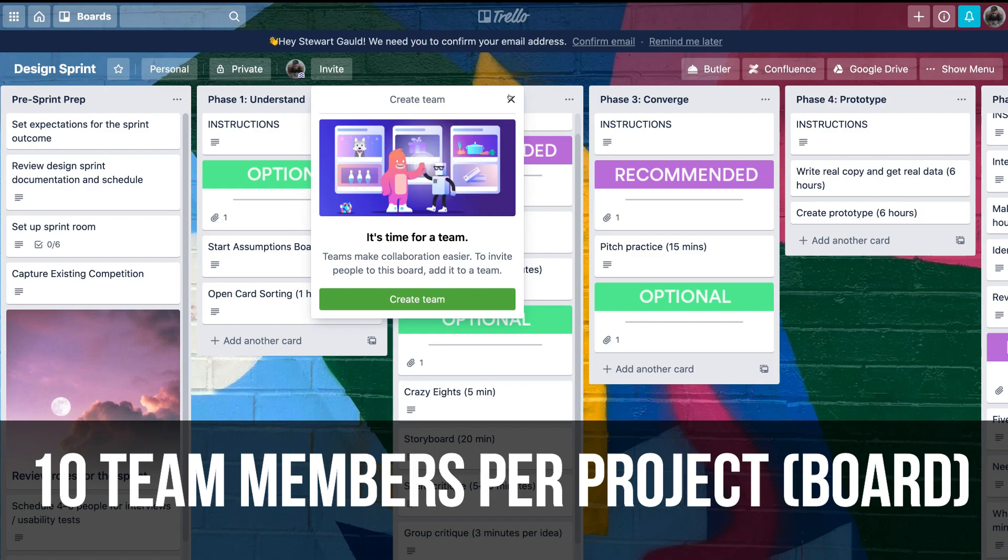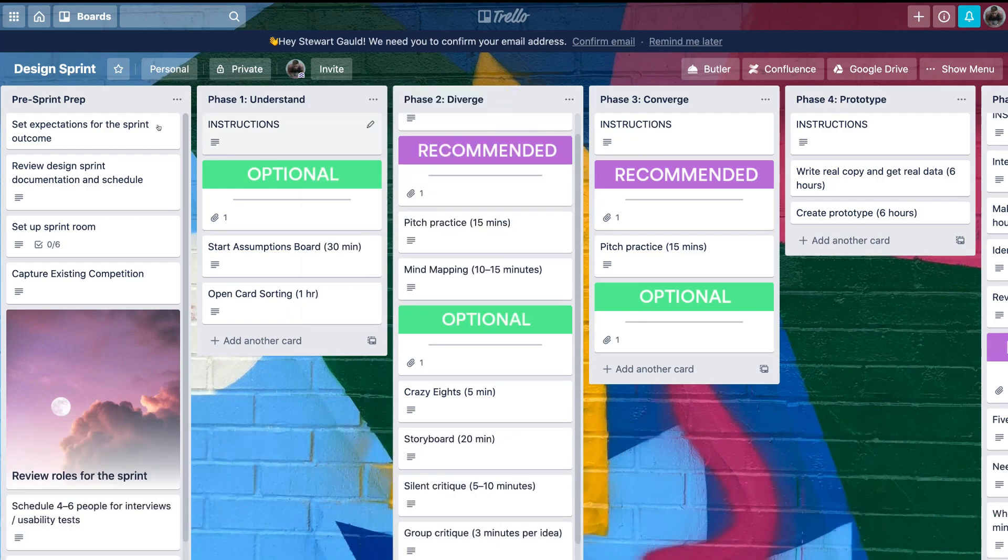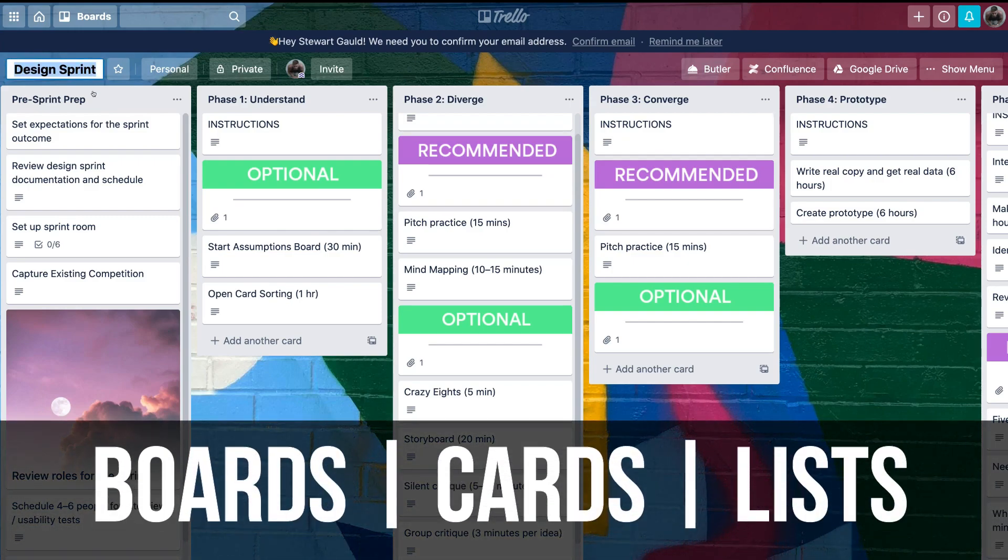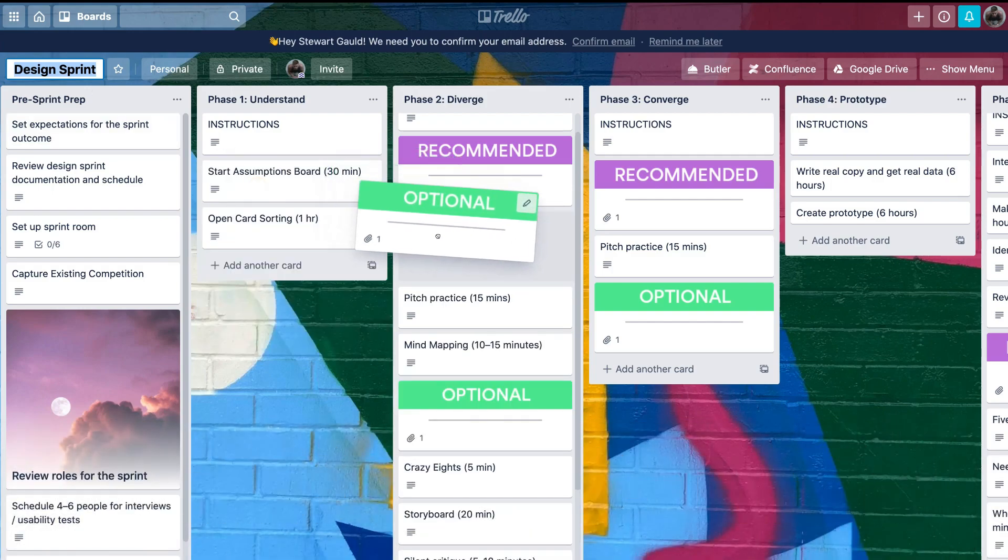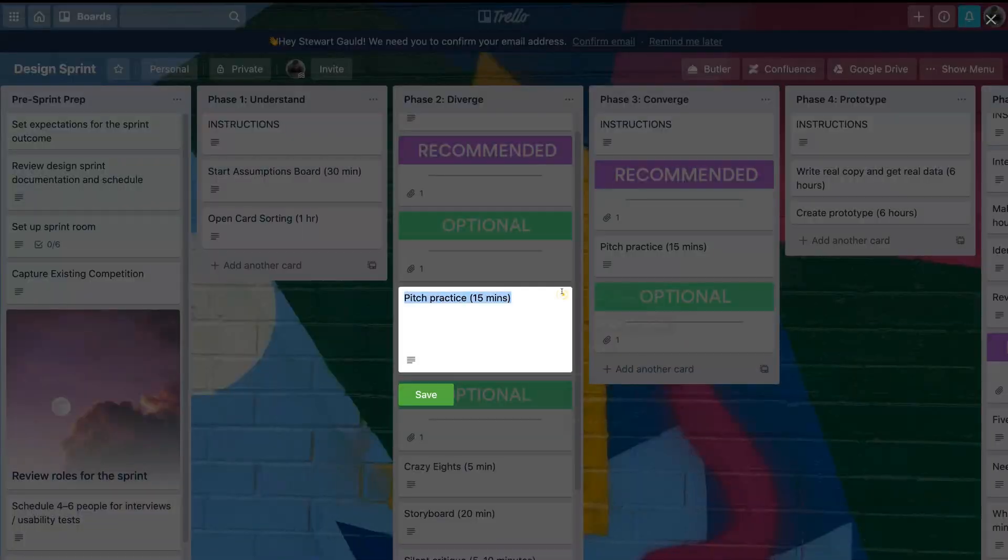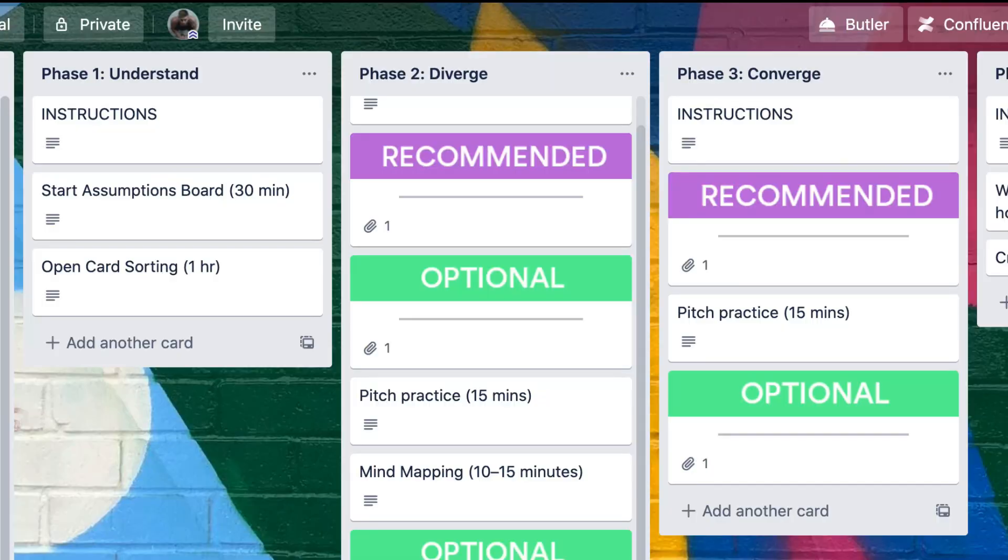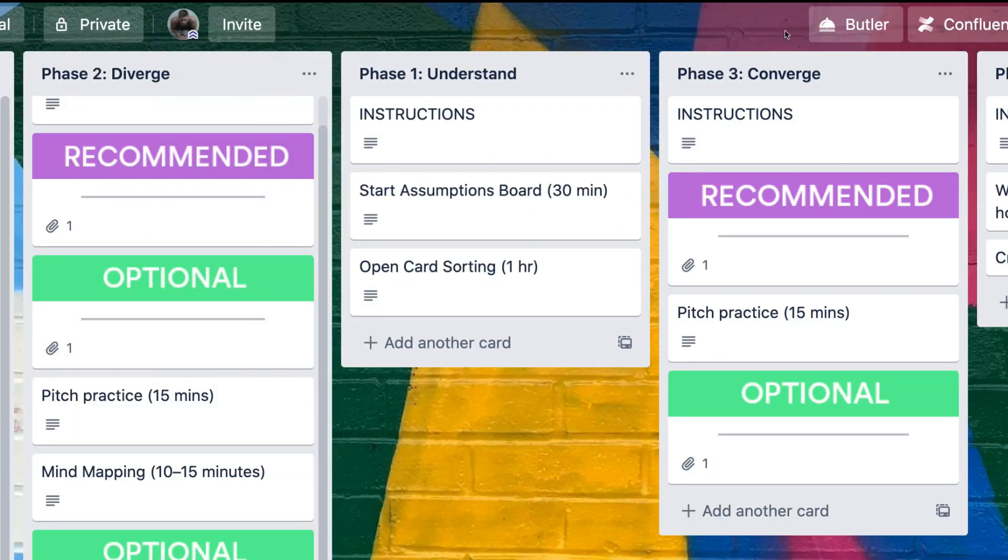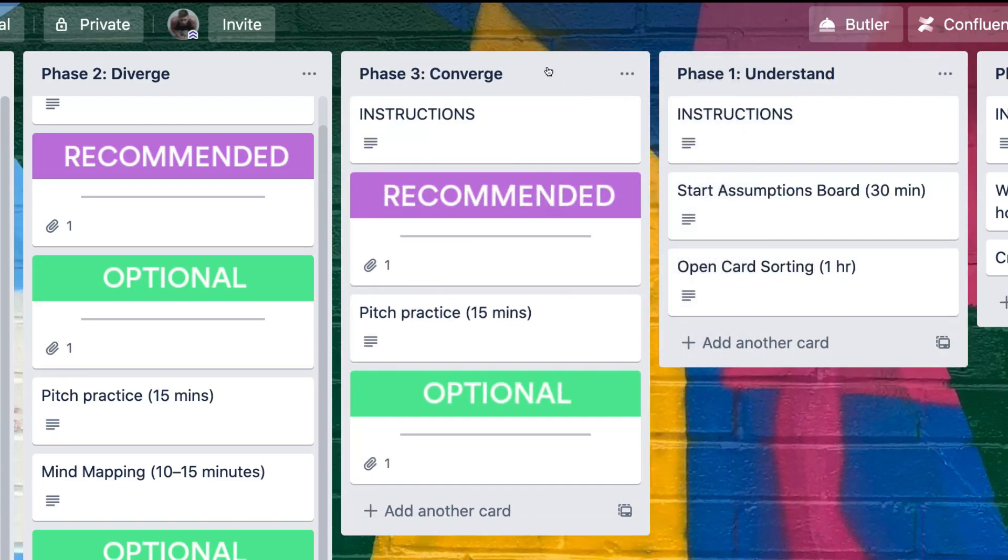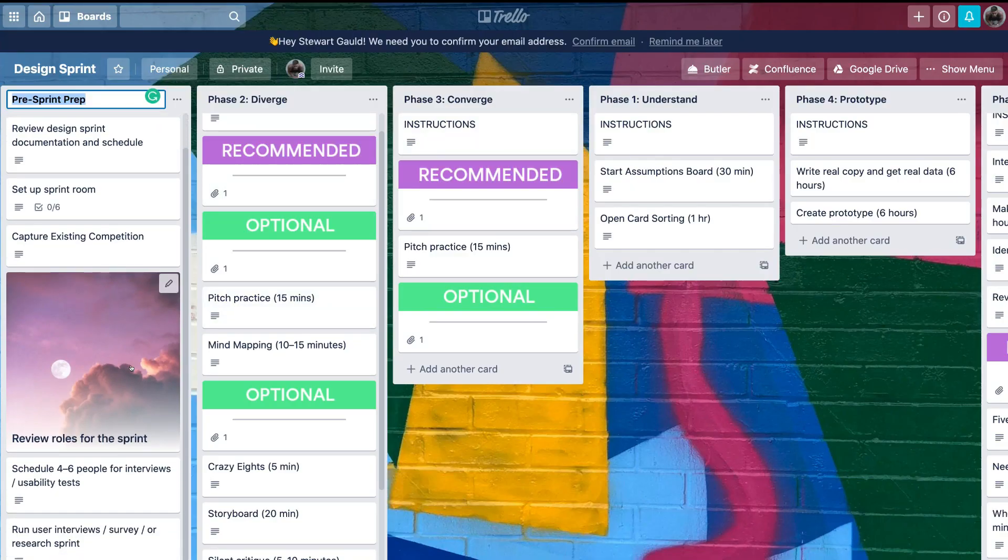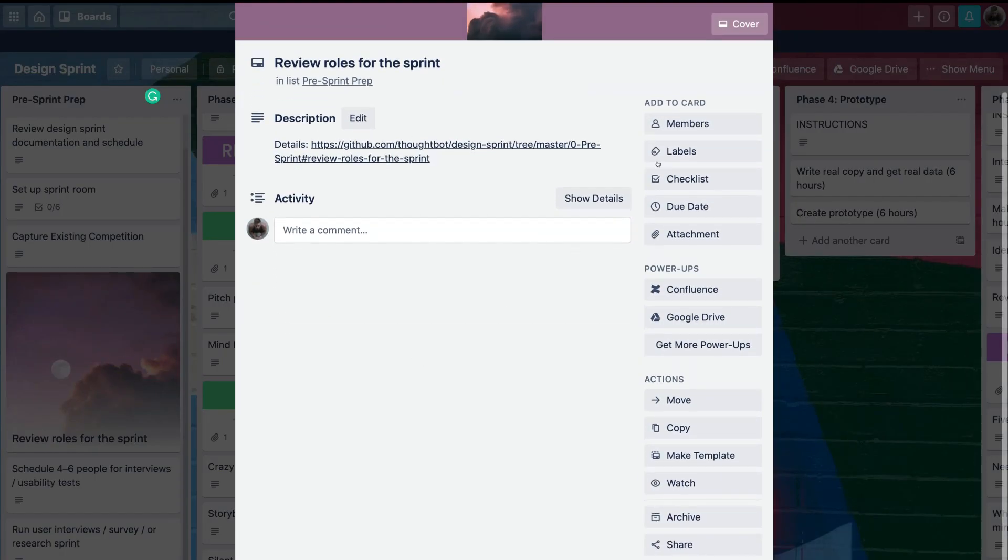To sum up the structure of Trello, essentially your projects or workflows are broken into three elements: boards, cards, and lists. Boards can be projects or team departments created for teams working on a specific project. Then the boards are broken down into cards, which can be used to identify each stage of the particular project. Within cards we have lists, which is in essence the identified tasks, description, checklist, and due dates—basically the finer details for your team to work through.